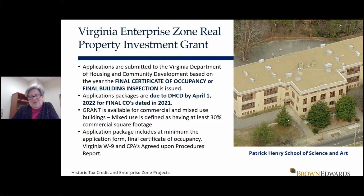We've tried. Sharing one story that happened to one of my clients, which was truly unbelievable. They had done a small retail storefront, and at the time that they put in the door, they had the bumper at the bottom of the door fully in compliance with ADA. From the time that they finished the project to the end of the year, the ADA standard for that threshold, or kick plate essentially, had to be made larger, and they had not done it by the end of the year. So that final certificate of occupancy was waived, and they had to get a new one, which was not granted until the next year. So we had to retract that application and submit it again for the following year.